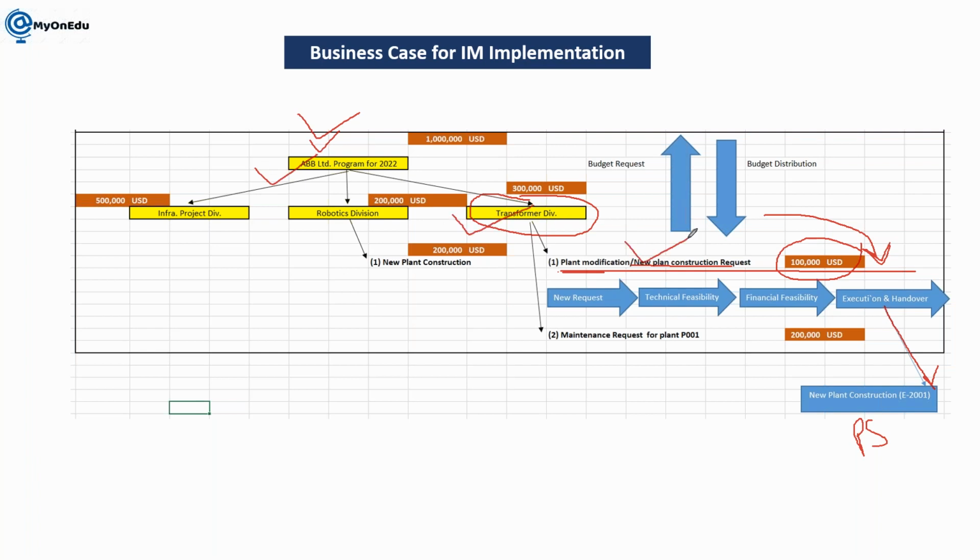You are creating the AR, the appropriation request, and planning everything in the AR, then it will be submitted for approval. Once it is approved, then it will be transferred to PS as a PS project. Okay, this is the process we have. So we'll go exactly in the same flow. This is a typical example of an investment project.